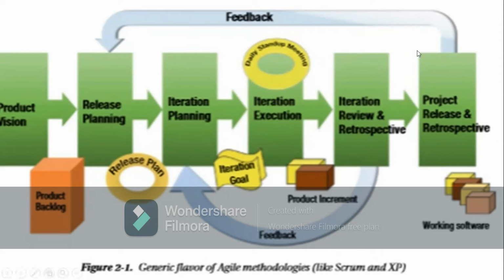So once he has all of those requirements that he needs to produce, he's going to place them into a product backlog, a big list. And he's going to add to that the flavor of priority: what are the high priorities and what are the low priorities. And then he will go to the development team. By the way, he's going to set the delivery dates as well. He will spend a half day with the team to explain the requirements, and he asks the team to provide him with an effort sizing.